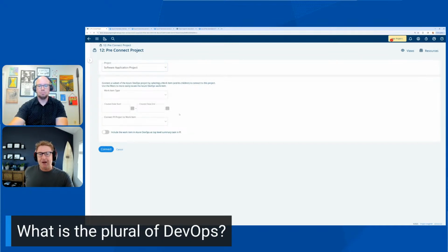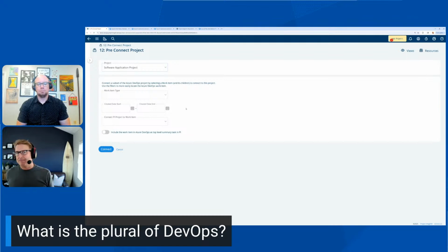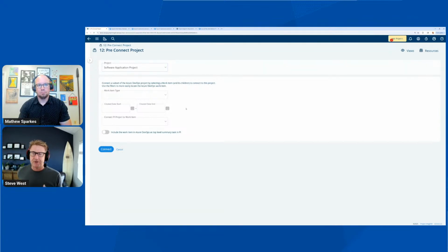Then you can decide how I want to map to Project Insight. And this is a good question, because in DevOps or Jira, a project typically is really more like a program. It never closes, it never stops, it goes on and on and on. You have 10 million tasks in your project in Jira or DevOps. But in reality, in order to be a project, you technically have to have a goal that we want to be done by, and how much effort and all that.